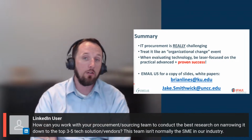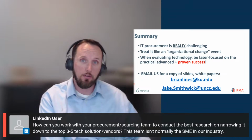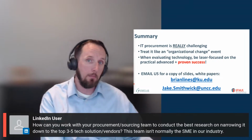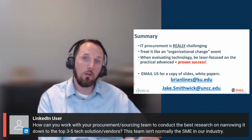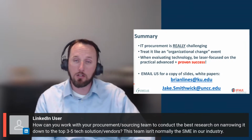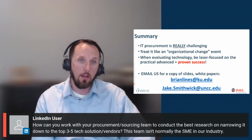Really what you're talking about here is a short list. And the way I would do that is I would go through and have your initial proposal evaluation, like the cost, their written proposals and other documents you want to look at. If you have a bunch of teams that have proposed here, then you can shortlist down and go through product demonstrations with just the top 3 to 5 firms. So it's a simple shortlisting process is the best way to do that.